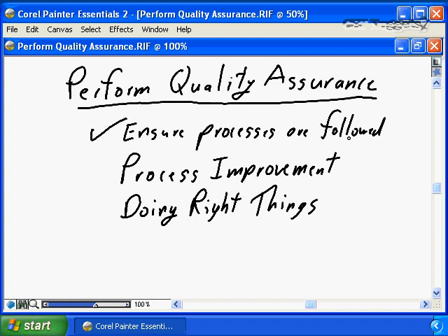If a team member finds a shortcut, finds a way to produce the document that's better, they are welcomed to implement that as part of process improvement, to talk to the quality assurance manager, to talk to the project manager, to say, hey, I think I found a better way. How about we change the standards and procedures to follow my better way? That's perfect. But if the project team member simply believes through individual heroics, if they shortcut the process, find a better way without changing the standards and procedures, that's not improving the project delivery scenario.